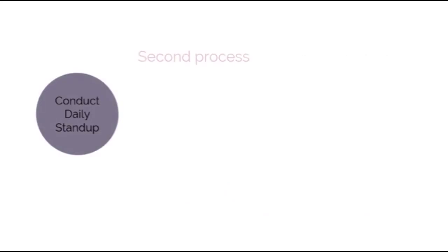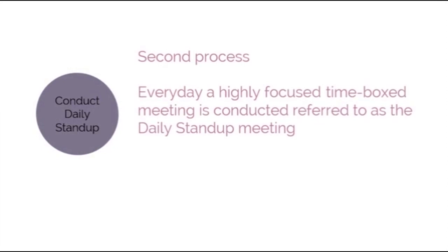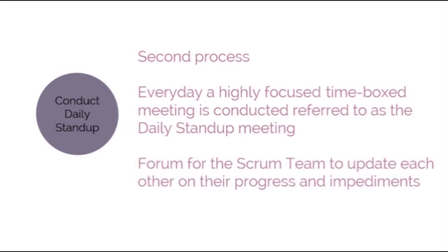The second process performed is conduct daily stand-up. Every day, a highly focused, time-boxed meeting is conducted, which is called the daily stand-up meeting. This is the forum for the Scrum team to update each other on their progress and any impediments they may be facing.